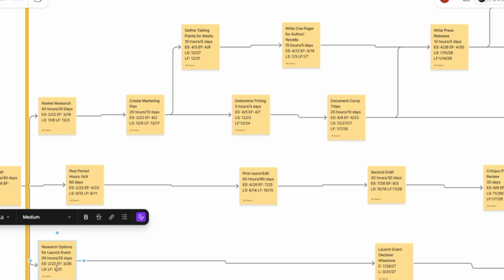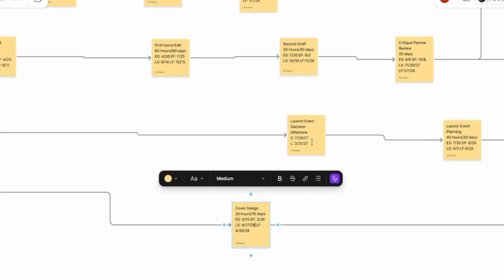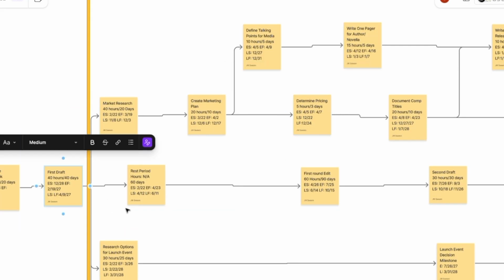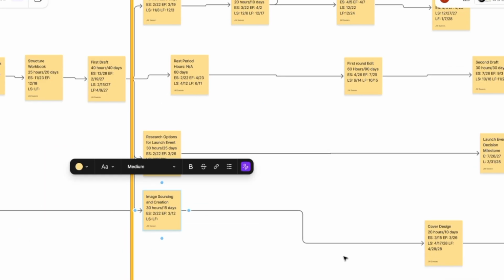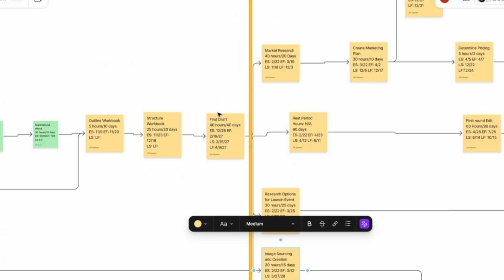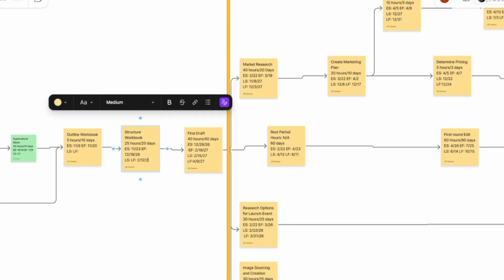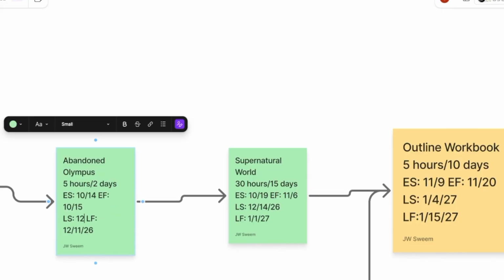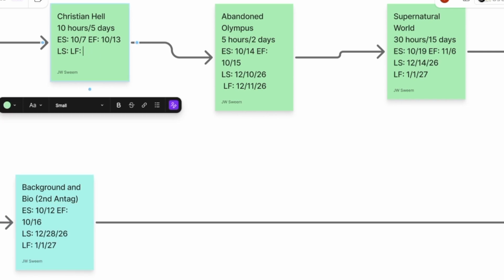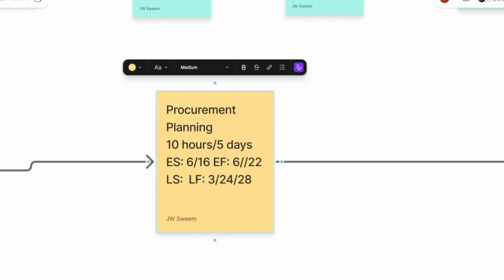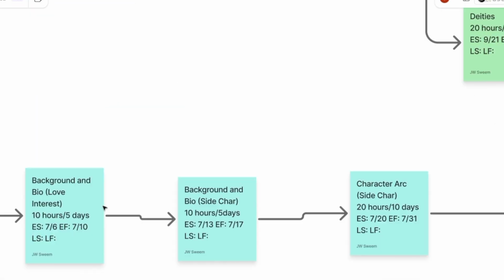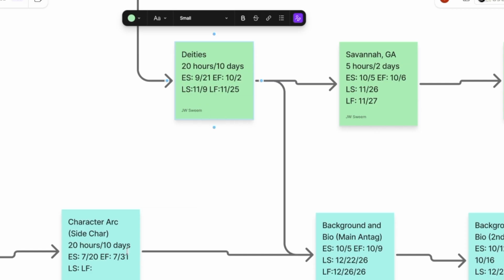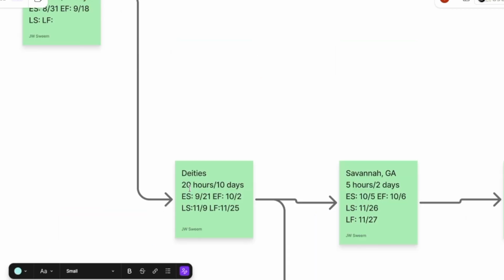Like some stuff, I get more flexibility, and it really helps you identify what tasks are really the critical tasks. What tasks are the ones that I cannot mess up on, or that I cannot afford to have any issues with. And what that does is it helps you prioritize time and resources and focus. So if you have a task that you know has like 30 days of wiggle room, you can put that one on the back burner for a little bit. But the task that has 0 days of wiggle room, you know that one is top priority, especially when you are a one person show.